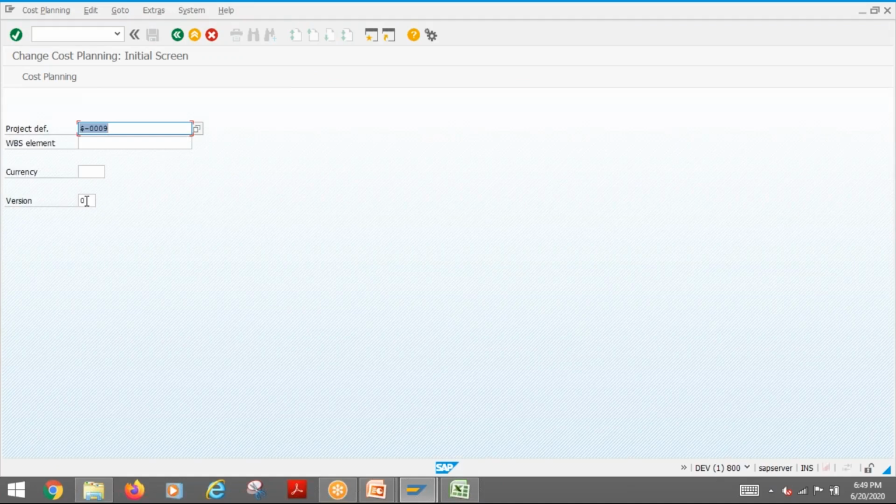Then here we talk about that version yesterday, right? And the project version, there is a CO plan version, where you can maintain the value in different versions. So CO plan version means you are recording the value against a version, not like a project version. Project version is something like you are taking a snapshot of that database. But here in the database itself, you have an option to maintain 2 values against one object, but against different versions. That functionality is available from the CO perspective. So that is what we call the CO version.